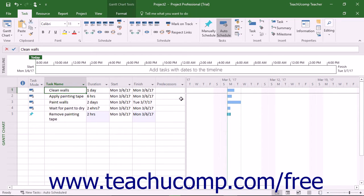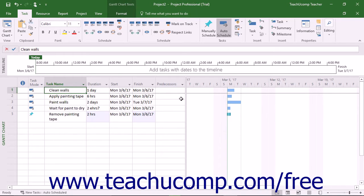The Finish-to-Finish link makes the dependent task's end time the same as the predecessor task's end time. The rarely used Start-to-Finish link makes the dependent task's end time the same as the predecessor task's start date. The Finish-to-Start link is most often used.